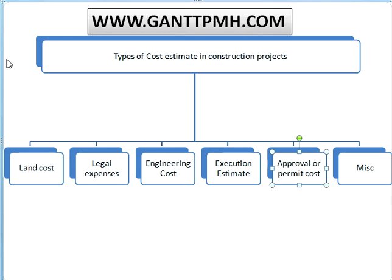For approval or permit cost — in India or in any country — we have local laws to follow before constructing any kind of infrastructure, buildings, or real estate. These approvals may be required before or after the project starts, depending on the requirement. For example, for water connections and electricity connections, we approach government agencies, submit forms, and obtain the necessary approvals.